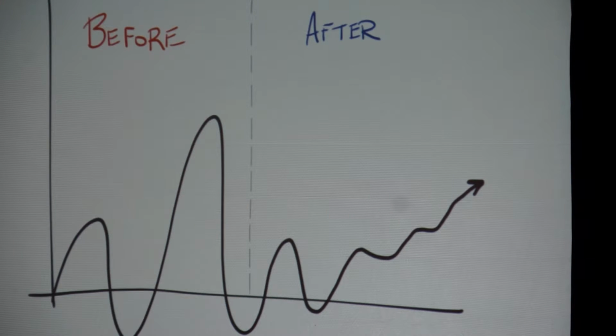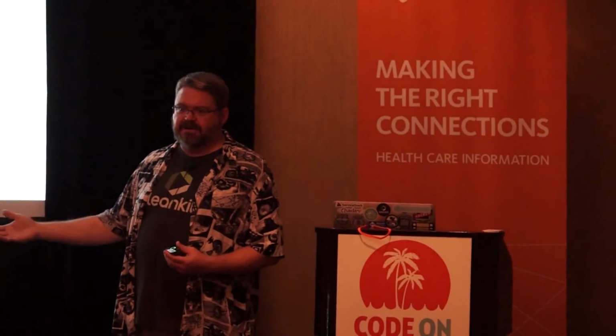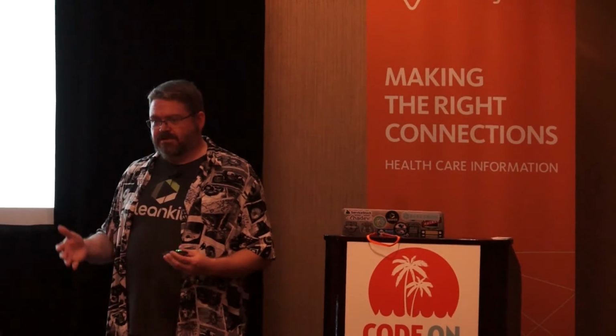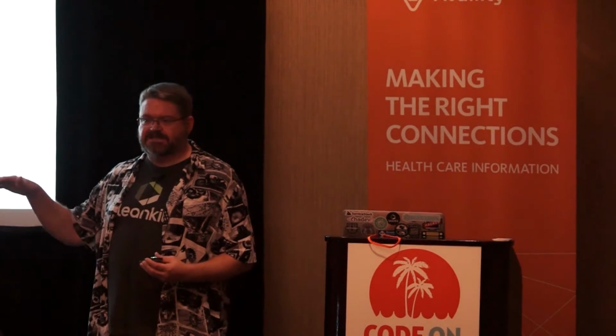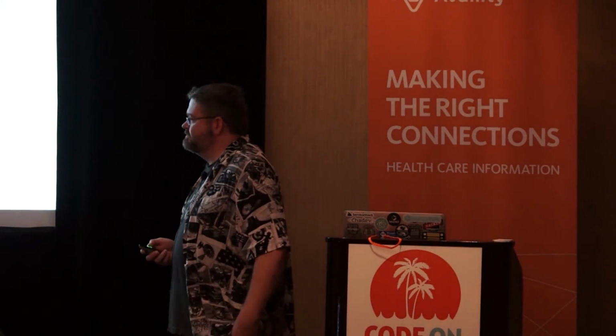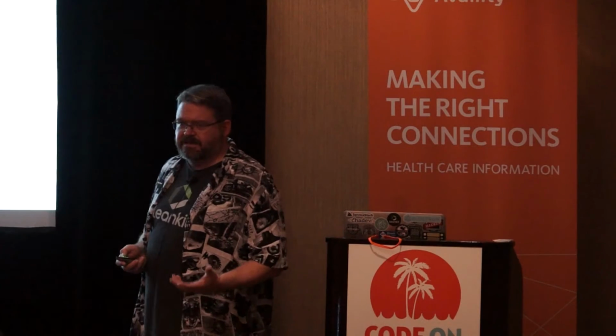The way we do our work becomes much more predictable, and we can start to answer those tough questions of when we can get that work done, because we can say statistically, with confidence, that the work on our board is going to take us X amount of days or X amount of weeks to complete, because we have refined our process to the point that we can confidently project those kinds of things. And there are statistical tools that can help us do that.